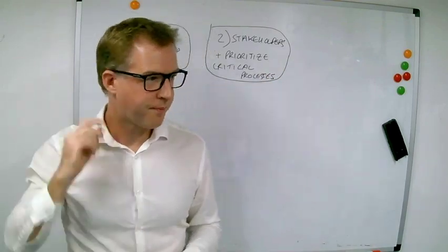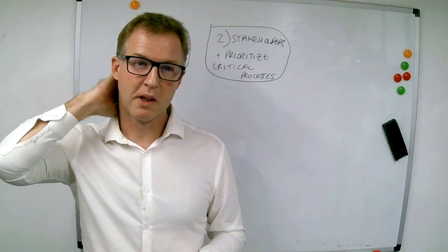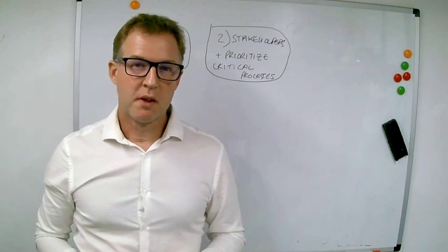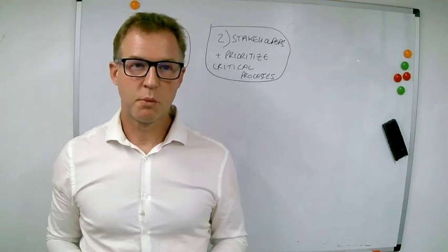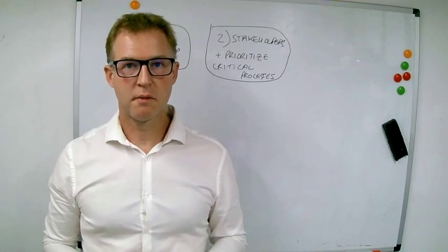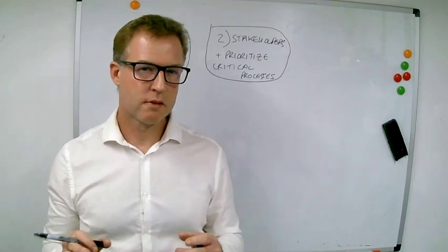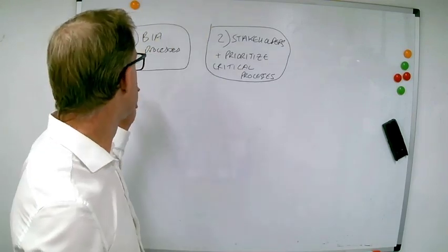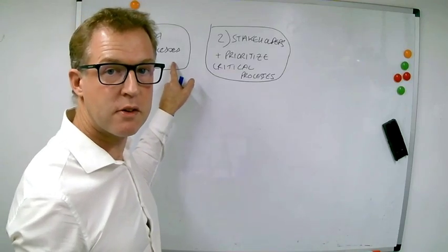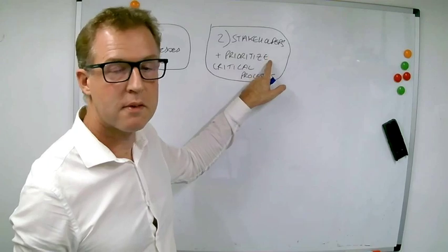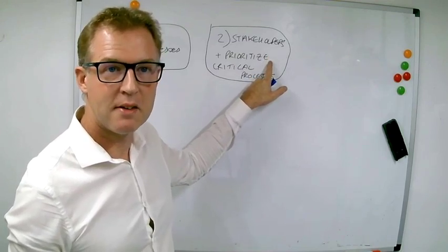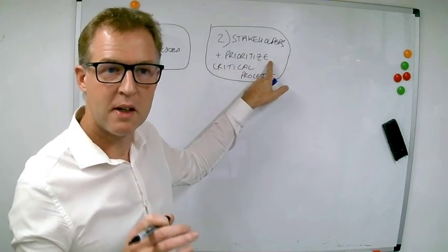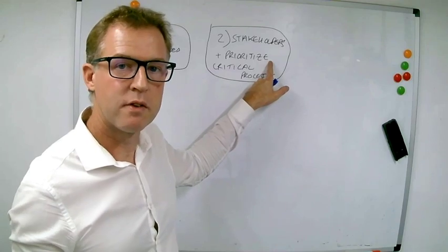To give you some idea, I honestly cannot remember how many processes were in the BIA list, but I think we got it down to about 15. So this was 15 processes that we were told are the core ones for the business and they must be resilient. They had different requirements for resiliency, but these were the key processes. So you've got your critical processes master list, you've confirmed your stakeholders, and you've got agreement with them on a subset of those critical processes that have to be resilient for your business.